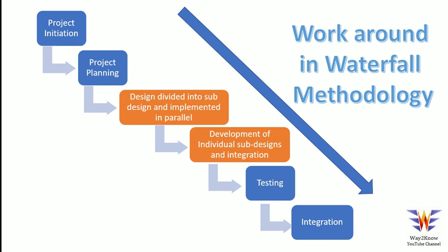And then what happens is, as these are being divided, everyone is clear, rather than taking it as a cumbersome activity. Every individual working on the sub designs is clear about their approach, and once it is integrated, everyone comes together and delivers the hardware or the firmware. And then after that, testing needs to be done on the complete system, and then integration has to happen. So the workaround could be possible here, because this is the critical step which determines the project success.